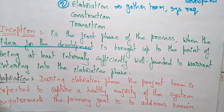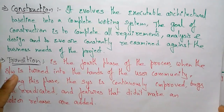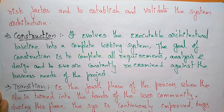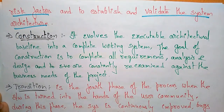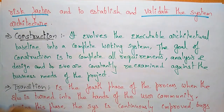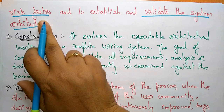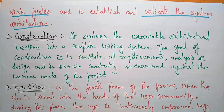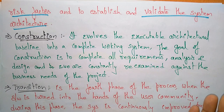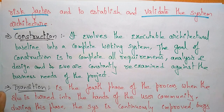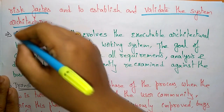The primary goal of Elaboration is to address known risk factors and to establish and validate the system architecture. You analyze the risk factors and validate the architecture. Whatever product you are going to start, first think about what are the risk factors and what problems might arise — those are identified and addressed in the Elaboration phase.